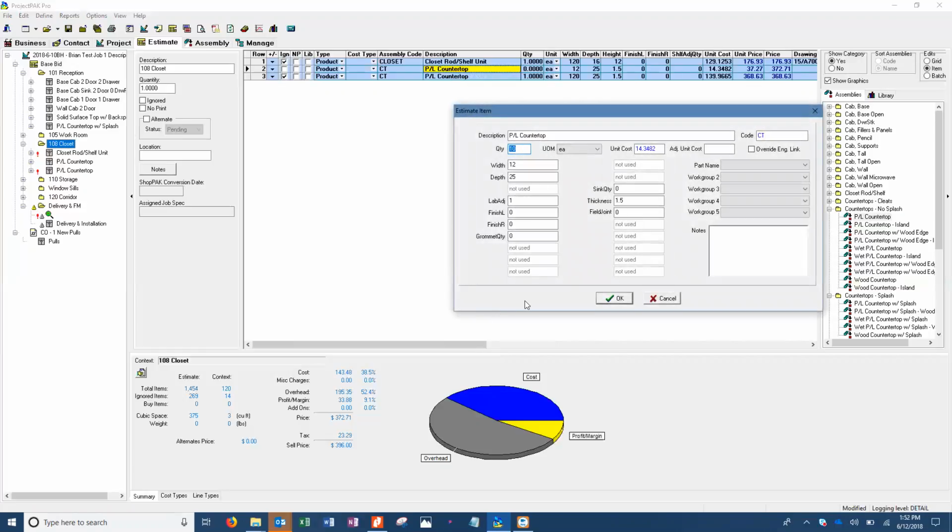So now you've got a field joint. If you put 1 in there, guess what? You're going to get 10 field joints, over here on the right in the center. Whereas on the other one, when you do a 10-foot, you might only have 1 field joint, right? You might do a 5 and a 5 or an 8 and a 2 so that you get that field joint. It's not going to price it right.